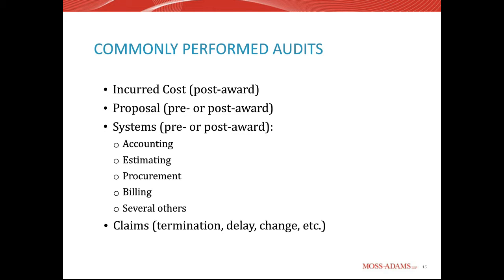System audits, of course, are pretty critical, especially for those contractors that are doing their first flexibly priced contract. When we say flexibly priced, we mean it's either a cost type contract, or a time and material contract, or a labor hour contract, or any contract type where there's some element of actual hours or cost involved. So if that contractor in the past has always been awarded based on commercial pricing, and hasn't ever had to bill based on actual cost, then it's pretty important to have that systems audit done,